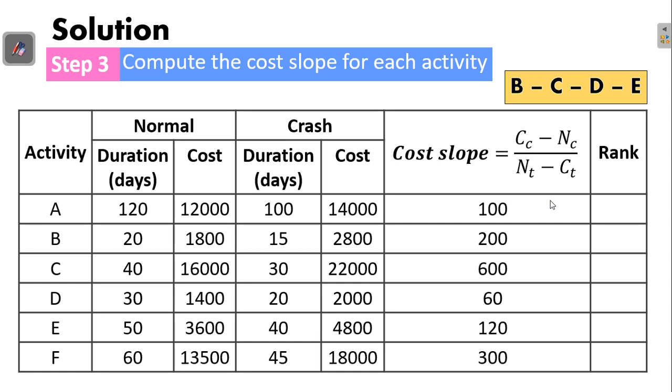Basically, from the previous video, we have seen that for non-critical activities, the total float is non-zero. That means you can delay for some time in those activities, but you cannot affect the total final project. But any delay in the critical activities will affect the total project duration. So if we reduce the number of days in these activities, then we will be in a position to reduce our total project duration.